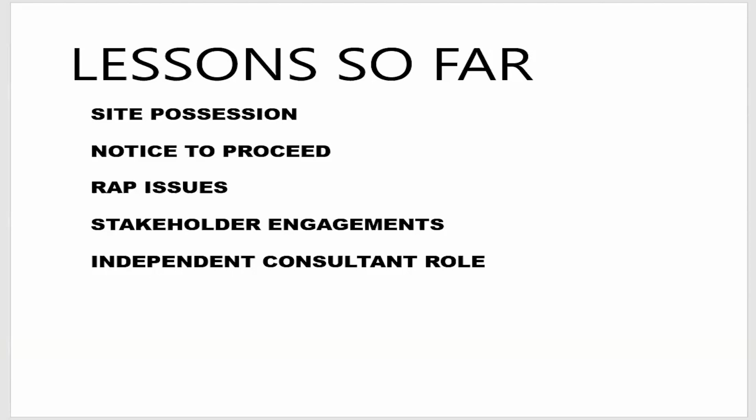Today and up to Friday, we are here engaging the people of Yendi, Zabzugu, and Tatale to explain the concepts. They come and they say that we don't have any supervisor from GHA or from a consultant supervising the road, so it means nobody is supervising the road. And you have to go back and explain to them that, well, the supervisor and the contractor are the same. So the stakeholder engagement is continuing, but I believe going forward, we need to educate the people more and get it grounded.